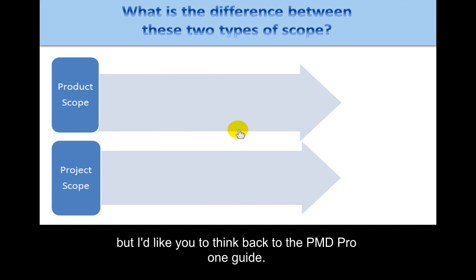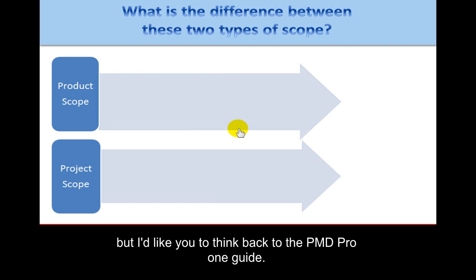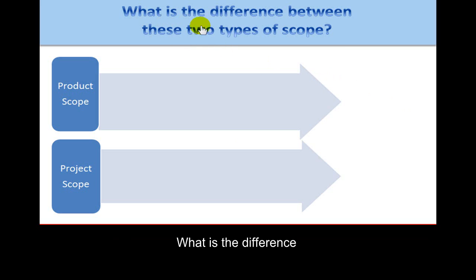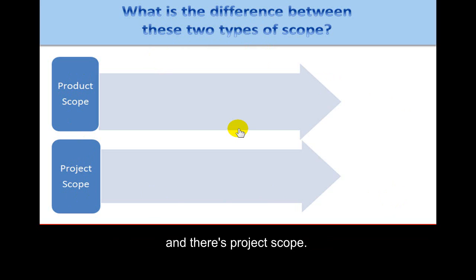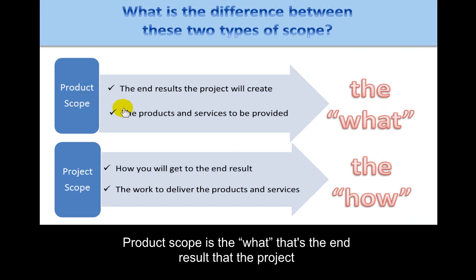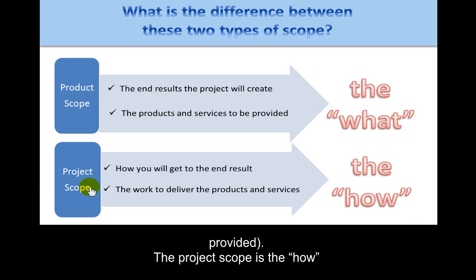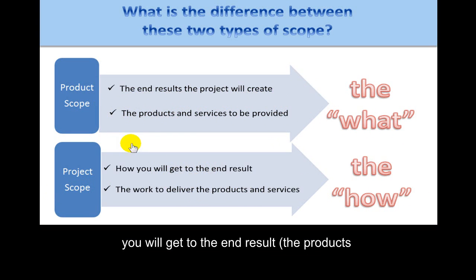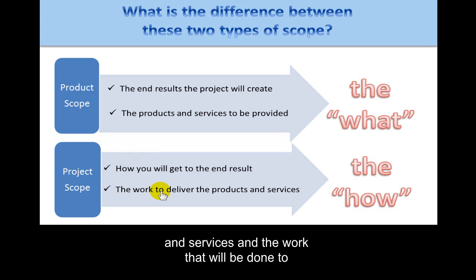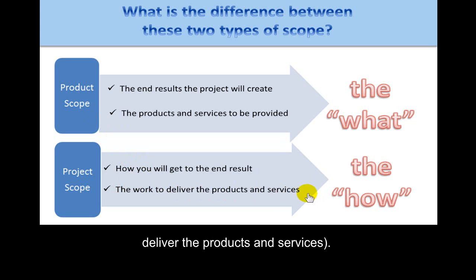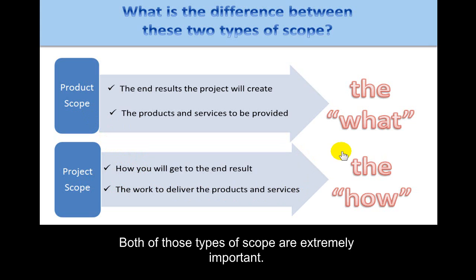Thinking back to the PMD Pro 1 guide, what is the difference between the two types of scope? There's product scope and project scope. Product scope is the 'what' — the end result the project will create, the products and services to be provided. Project scope is the 'how' — how you will get to the end result, the work that will be done to deliver the products and services. Both types of scope are extremely important.